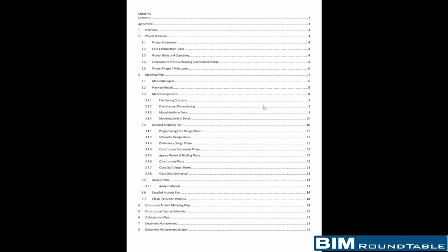So did you mention at the beginning when and who you hand this out to? Do you have a set of rules, and how do you mandate it, or do you even put it required as part of your contract or anything like that? Yeah, it's required as part of the contract. At the very beginning of the project, we actually have this up on our website for anyone to see. It's a PDF file of our BIM standards, or BIM requirements, and the BIM execution plan template is online. And I think we also have the COBie spreadsheet, like what things we want to see there as well.